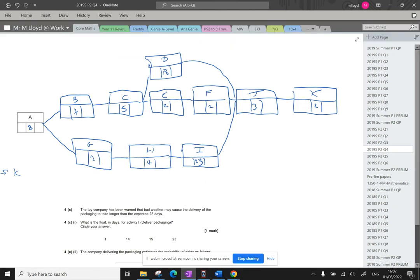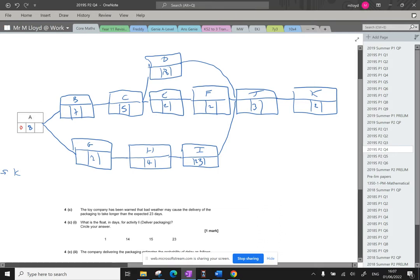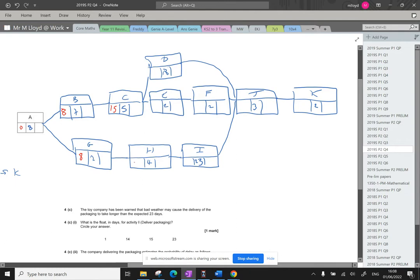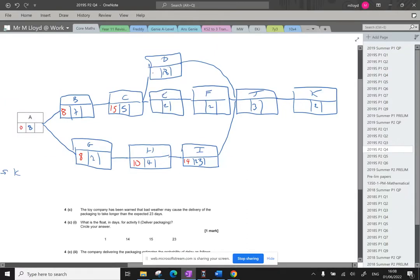Now, the project will start at day zero. It's going to take eight days for A, so that means that the earliest that B and G can start is eight. B takes seven days, so the earliest that C can start is 15. G takes two days, so the earliest that H can start is 10, and then I'm going to go over to here for 14. So we add that duration.